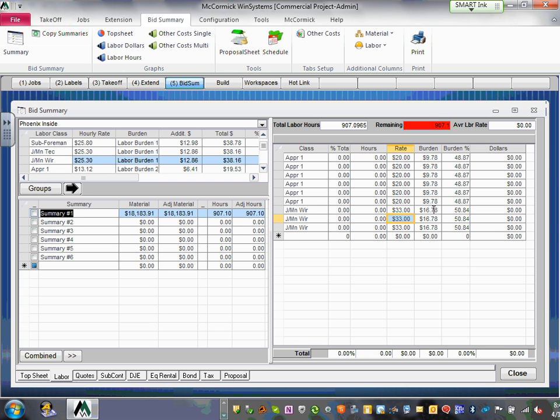So for example, this journeyman, in reality, it's costing me $49 with the benefits. Okay, that's for a non-union shop. Not bad. The apprentice guys, it's almost $30 costing me with benefits. Cool. Everybody got that one? Let's leave that one. You can adjust it though if it's higher or lower.